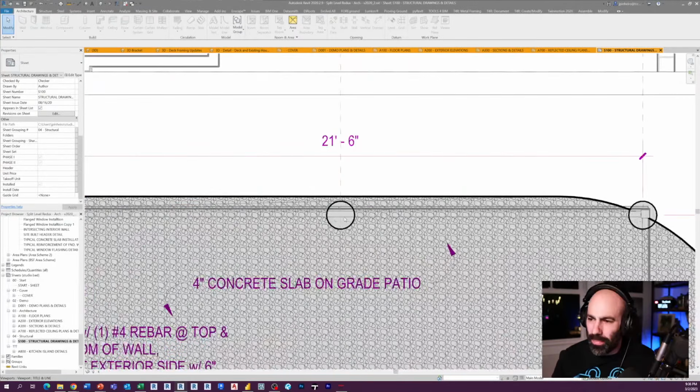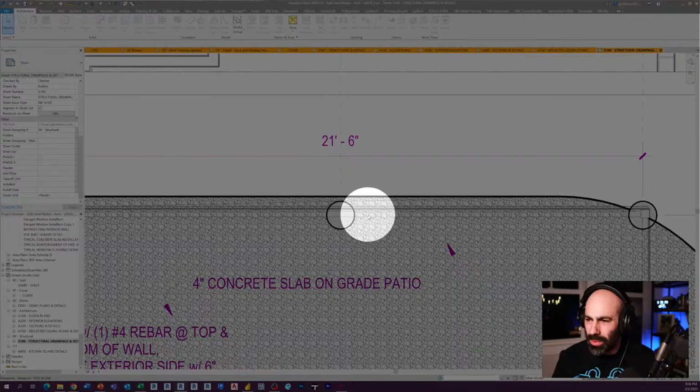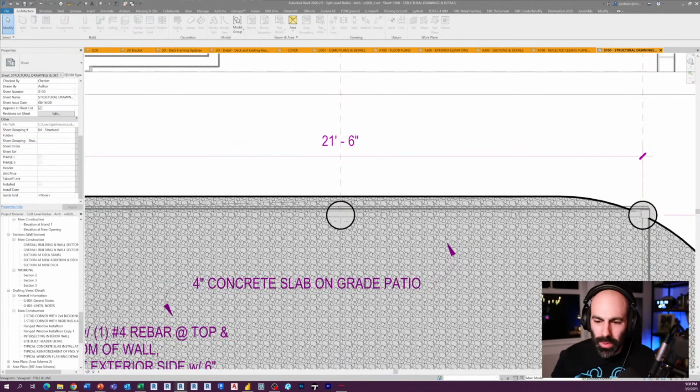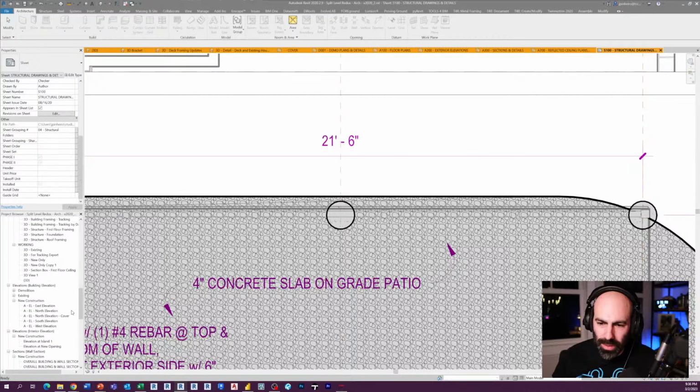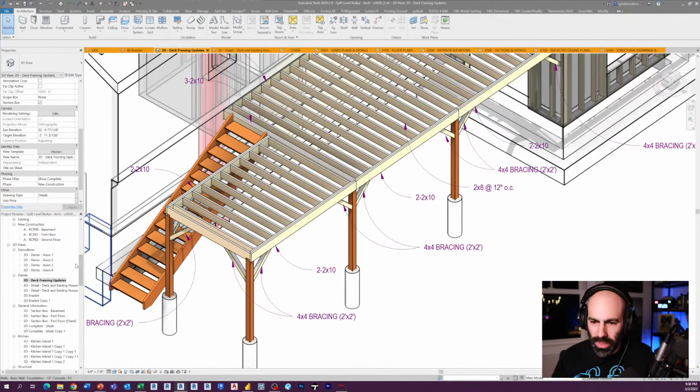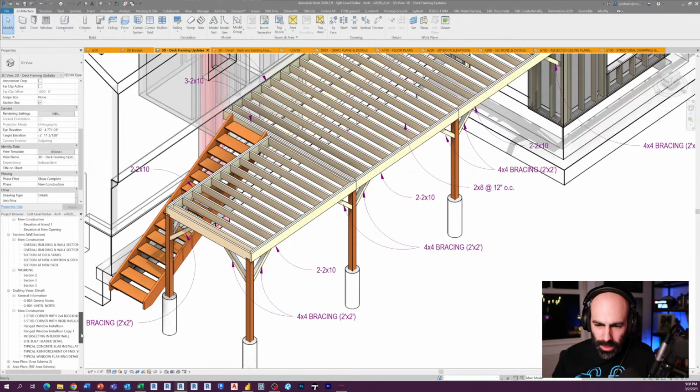It couldn't be 6 inches this way or 6 inches that way. He literally dropped a plumb bob, and the line was exactly where the column was for the deck. So it was not too bad of a fix. When he was laying out the columns, I reworked the deck, and basically we shifted the posts and recentered all the posts as we go along. So let me